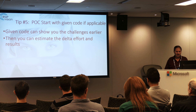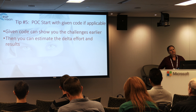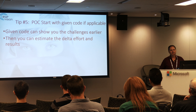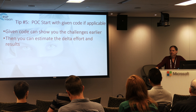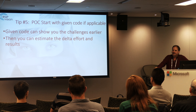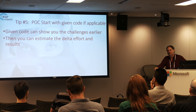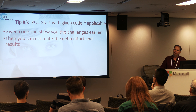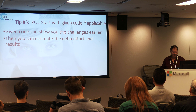Tip number five: proof of concept (POC). If during the POC you can use existing code — from the internet or a research lab — to make the first stages, it helps greatly to understand the more complicated cases. Then you can scope the work: maybe there is some algorithm that does 90% of the work, which isn't enough, but now you can see exactly what the remaining 10% is. It helps you scope the work that still needs to be done.